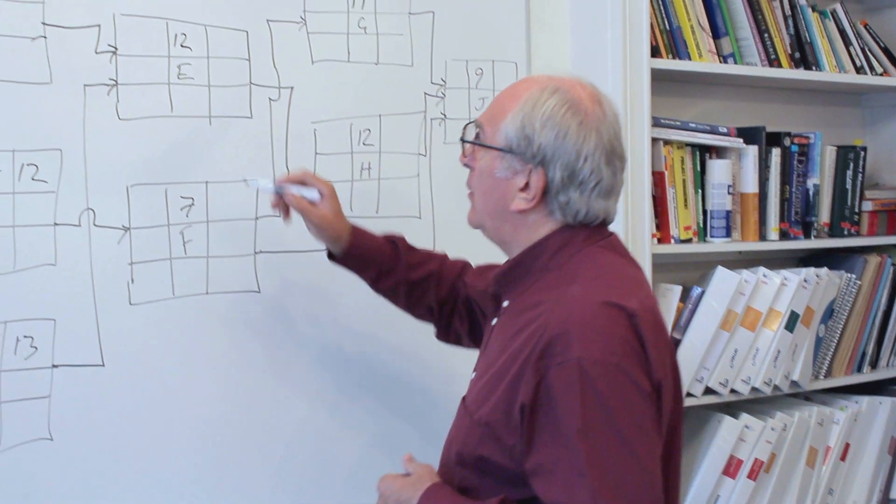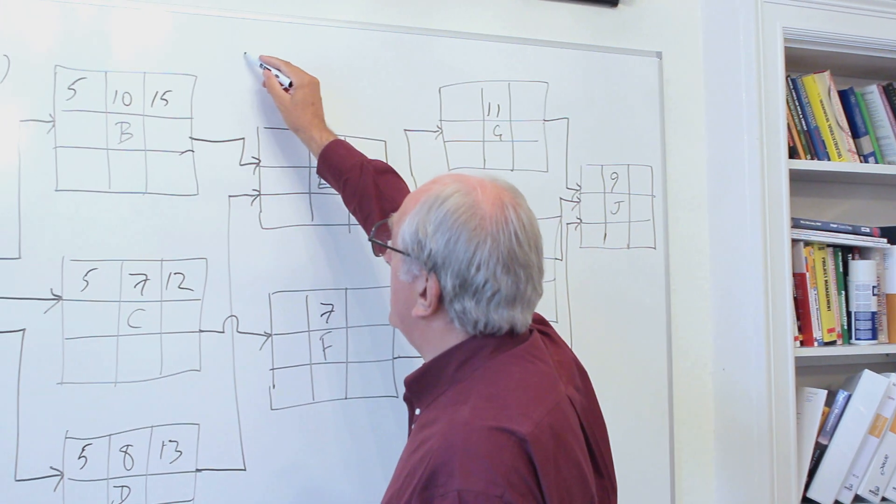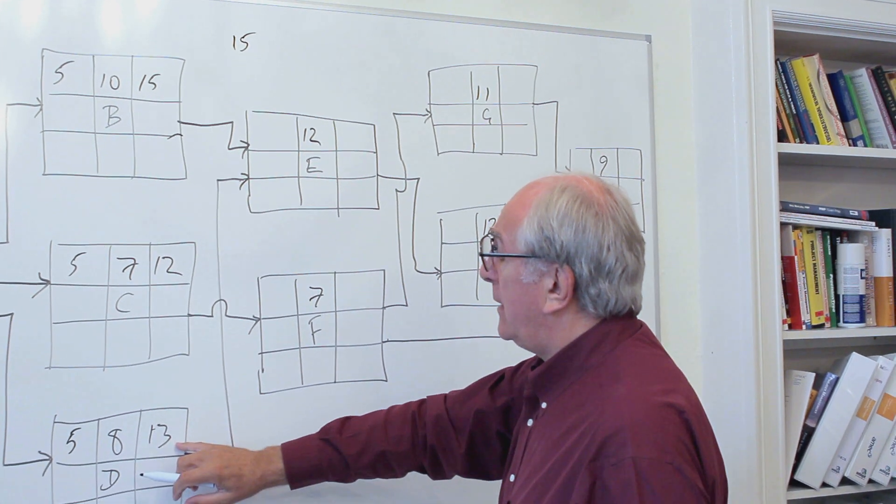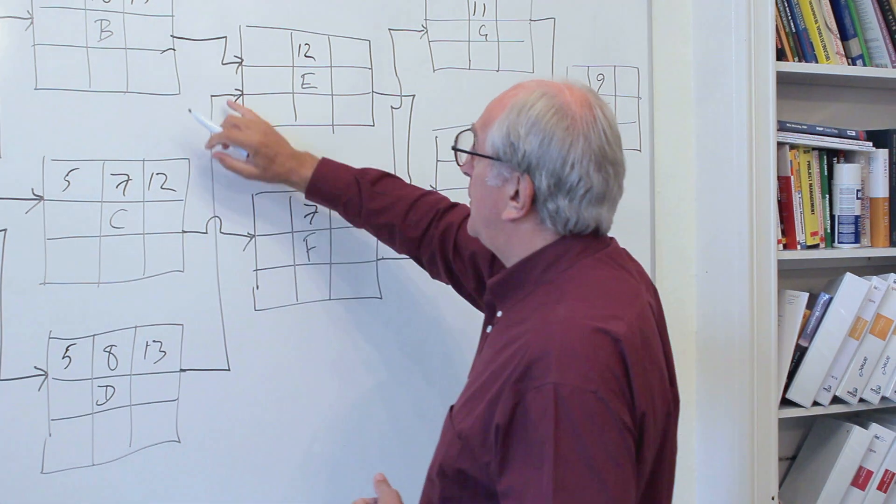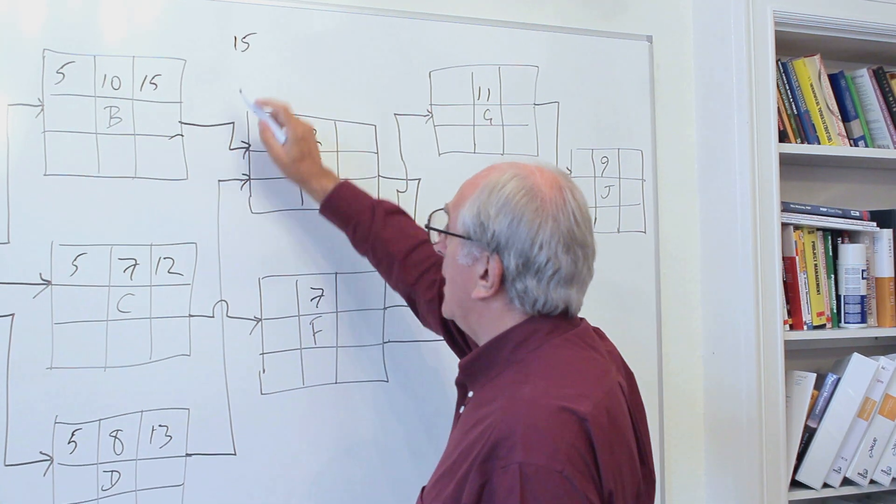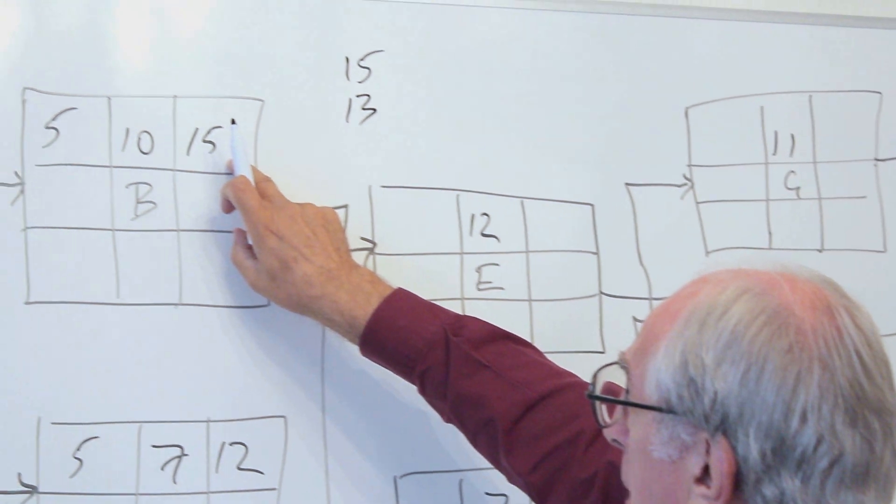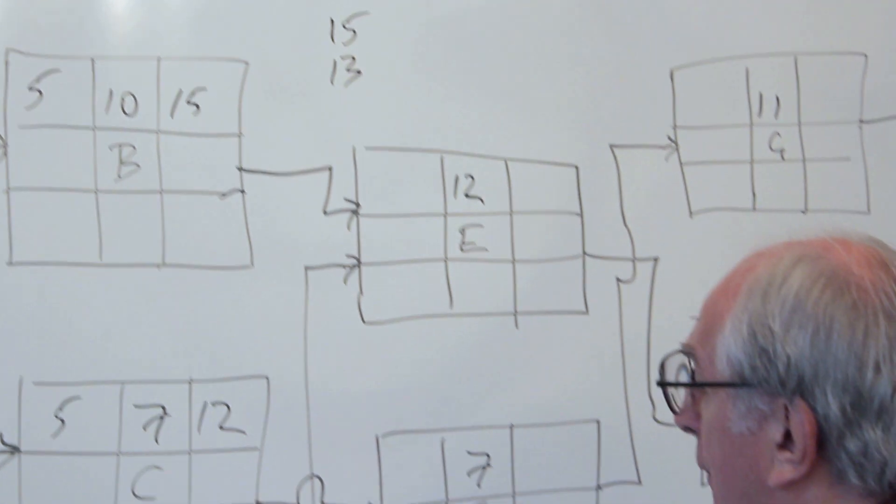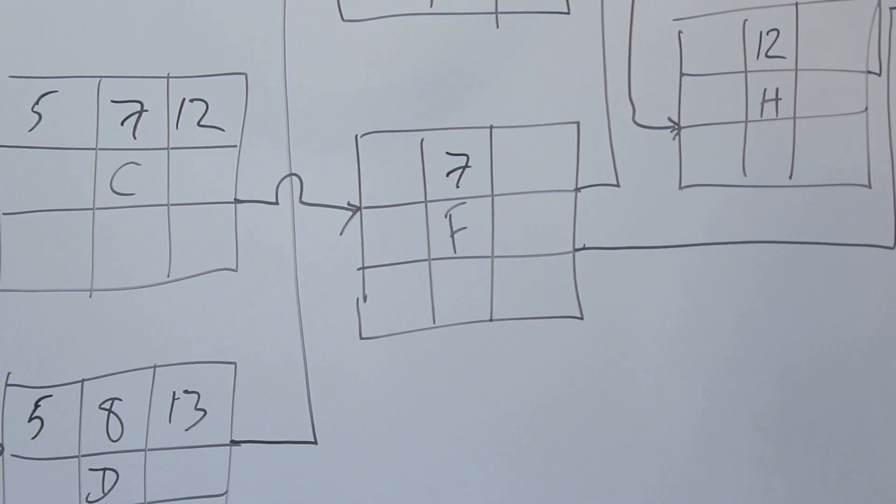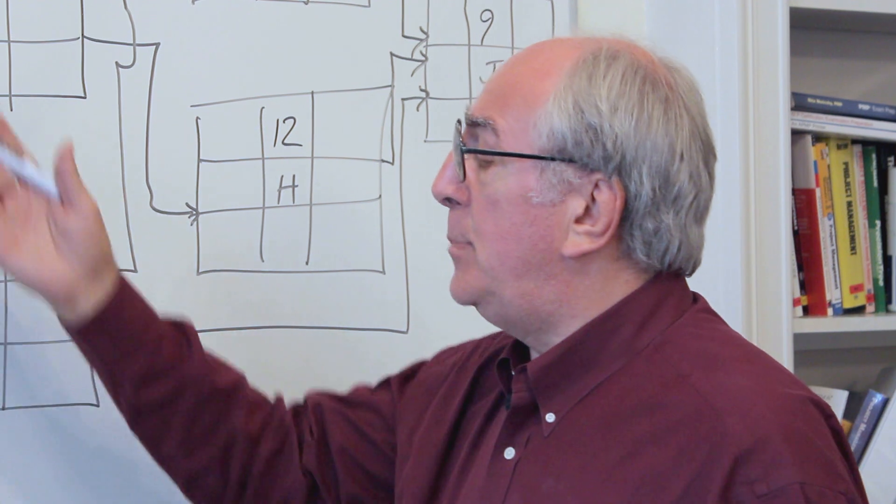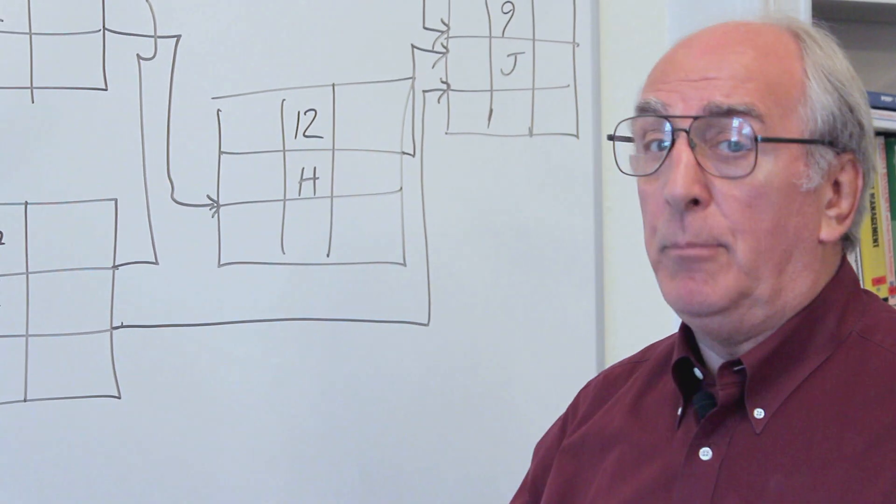Well there's two choices there because it looks like we could start it by the same reasoning as before at time period 15, or from D where the late finish moves up to become the early start of E, it could be 13. So it could be the early finish of B or the early finish of D. We have to choose between those.